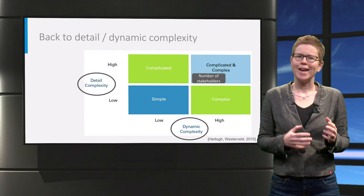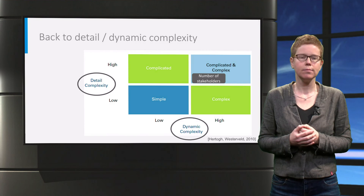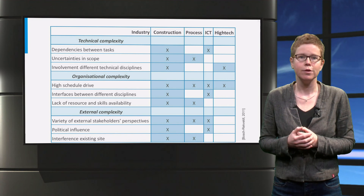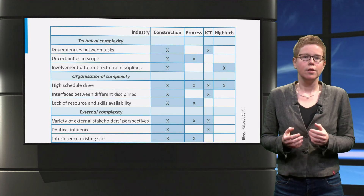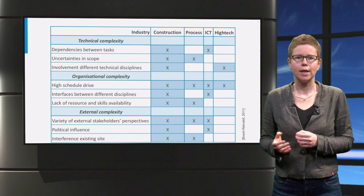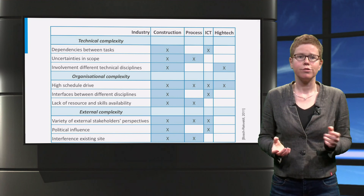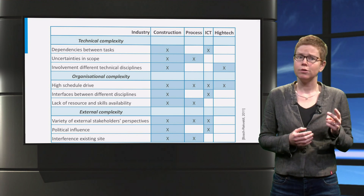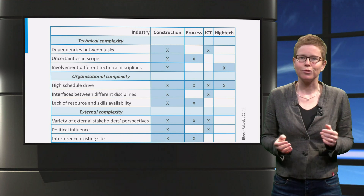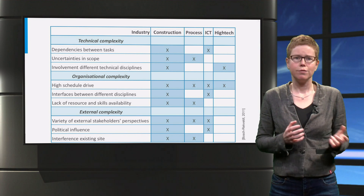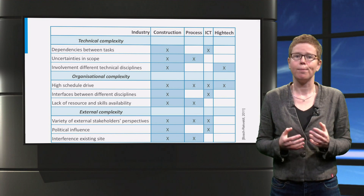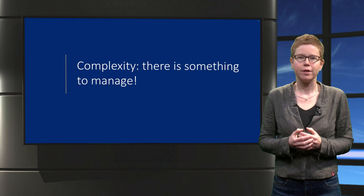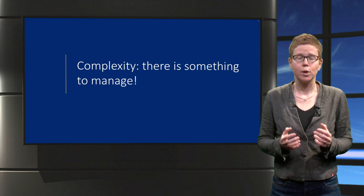Let's look at some research results to see if any complexity elements seem more prominent than others. In various researches across process industry, construction industry, ICT, and high-tech product development, we investigated complexity faced in contemporary projects. We found several similarities in the top lists of complexity-causing elements. A high project schedule drive was mentioned in all sectors, and variety of external stakeholder perspectives in all sectors but high-tech. Several elements appeared in two sectors: uncertainties in scope, dependencies between tasks, involvement of different disciplines, lack of resources and available skills, interfaces between disciplines, interference with existing projects, and political influence. Quite a few of these elements were shown to have a direct relation to project performance — so there is something to win when we are able to recognize them early in the project and learn ways to deal with them.